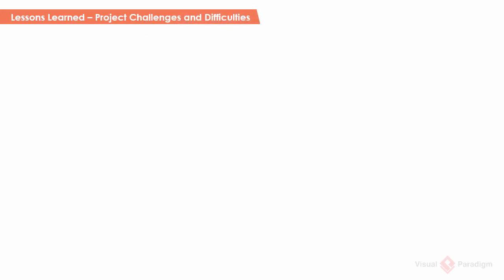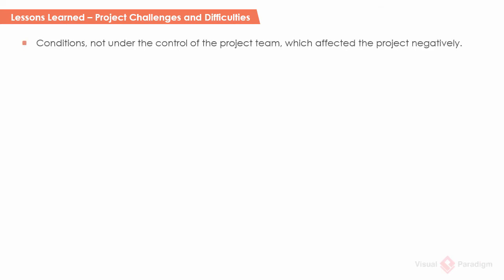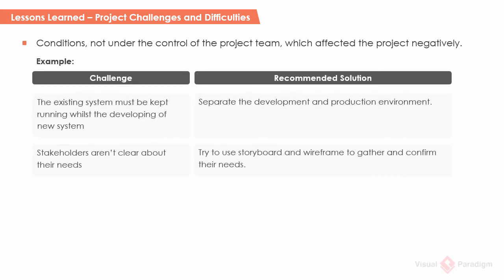Project challenges and difficulties refer to conditions not under the control of the project team which affect the project negatively. You have to describe the challenges faced and the solution recommended. For example: it was required that the existing system must be kept running whilst developing the new system — a situation the team faced and had to tackle. A recommended solution is that the development and production environment should be separated. A recommended solution can be one that was implemented and found effective, or a better alternative to the implemented option.